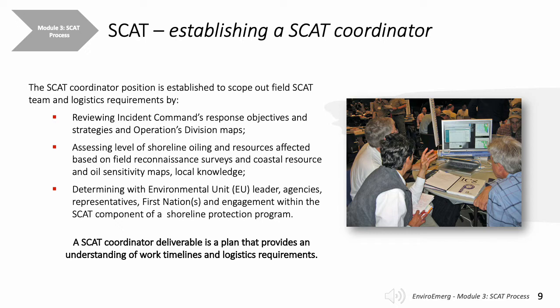This is a very demanding position, for the SCAT coordinator has to scope out the number of field SCAT teams required, their logistics such as transportation, as well as manage what services are required within the incident command post, like data analysis and packaging, such as the daily shoreline recommendation forms to guide operations.